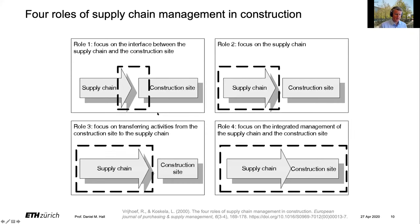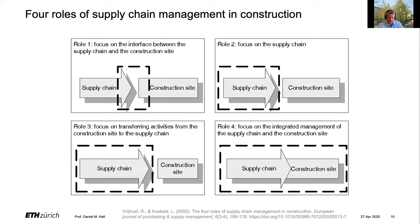As you saw in the reading, there are four roles of supply chain management in construction. This applies to all construction, not necessarily just industrialized construction. The first is the interface between the supply chain and the construction sites. The focus here is about reducing the costs and durations of site activities and making sure there's no impact on the delivery or availability of the supply chain.